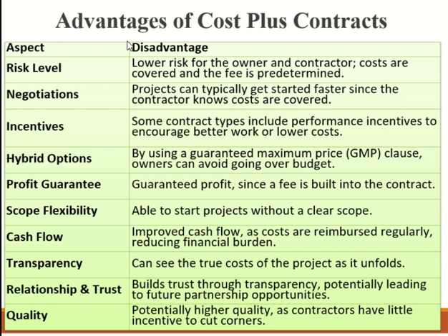Don't worry. So what are the advantages? There's lower risk for the owner and the contractor. Lower risk in the sense that if things don't go according to plan, you will not go into conflict. Your contract has enough flexibility to take on a very vast amount of work. Negotiations, or the signing of the contract, can start very early, even before the design, even before you did the cost estimation, because you don't need it for the contract. That can be added later.